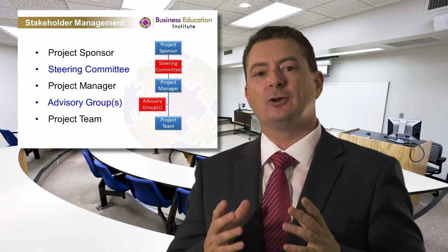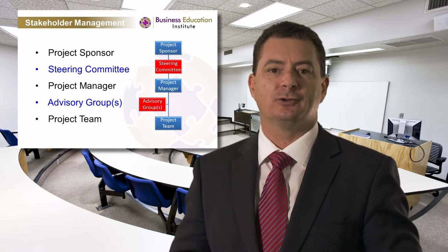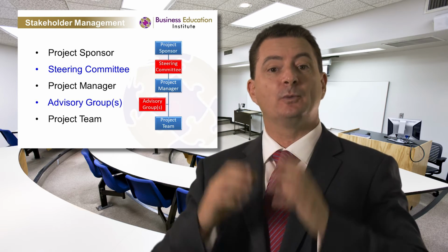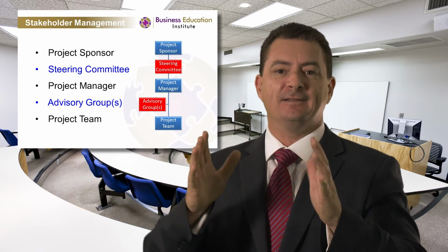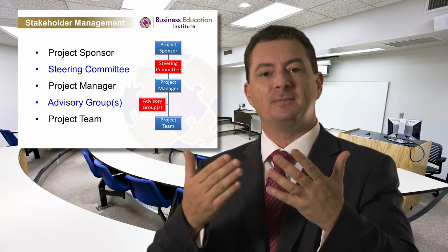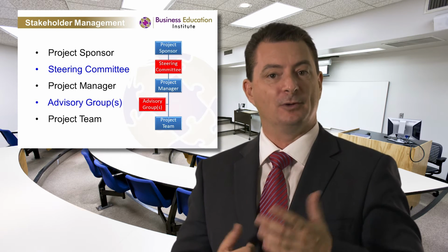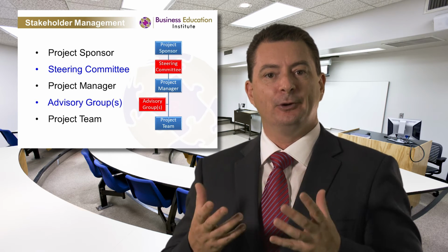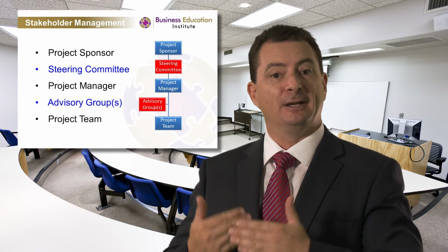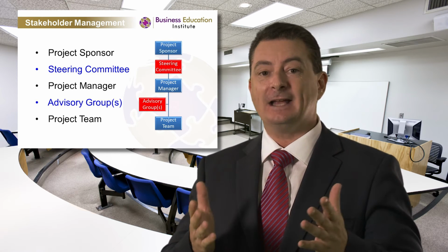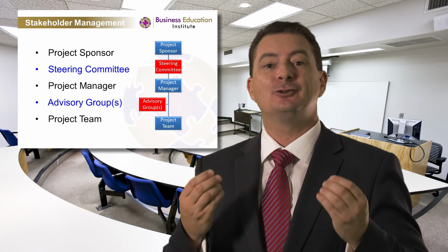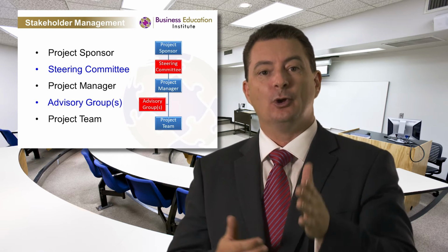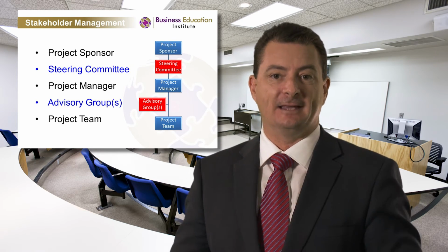And if you look at an organisational chart as an introduction to a project, you'll see that the project sponsor is the person we're working for. They're the executive. They're the ones that sit at the top that the project manager is effectively reporting to. The project sponsor has the ability to approve the use of resources, but also the ability to cancel the project. In fact, if you think you've got the wrong person, a little trick we can use is we can ask, if this project gets cancelled, will you have the ability to make that decision?